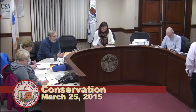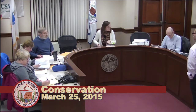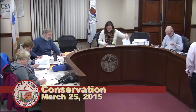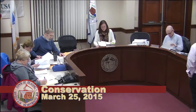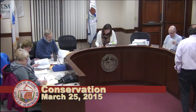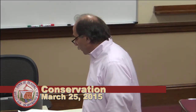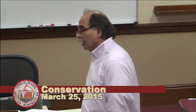George Zamboris, Town Engineer. I know Ryan was here for the initial public hearing, and one of the concerns, although I think the commission may have had less concerns, but one of the reasons to modify what we had proposed was based on comments from DEP that the way it was worded before may trigger the 401 water quality or the 404 Army Corps General Permits. So we modified what we had proposed and made sure that no project that's eligible under this permit, if it involves 401 water quality or dredge water quality certification or the Army Corps 404, is permitted under this application.